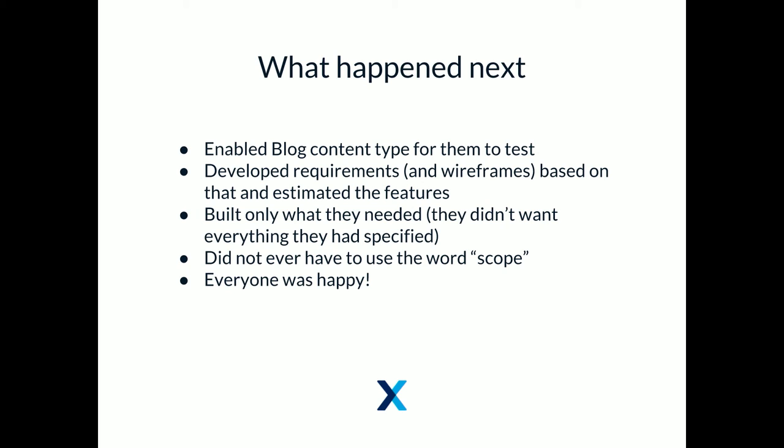And we estimated each feature separately, gave it back to them. They decided that some of the features they asked for, like subscription and notifications, they didn't really need yet. Let's see if people are actually reading this thing first and go ahead with the basics. So we didn't end up arguing at all about what was included, what wasn't included. There were absolutely no surprises. It probably took a little bit longer because there was a lot of back and forth.